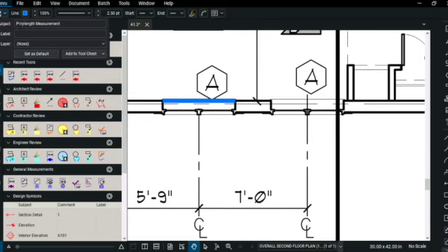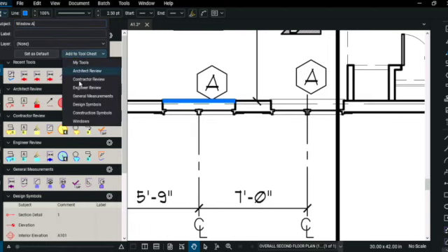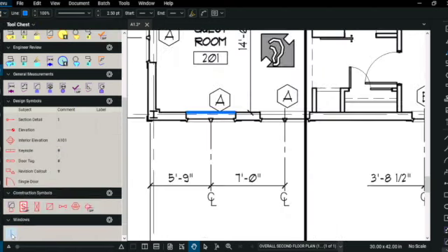Once you have your desired properties, click on the left side, rename the subject, and add it to the tool chest. Select the tool chest that you created earlier in order to duplicate the item quickly and easily. Now, instead of mapping and measuring window A again, you can select the window A tool that you recently created and place it over window A.